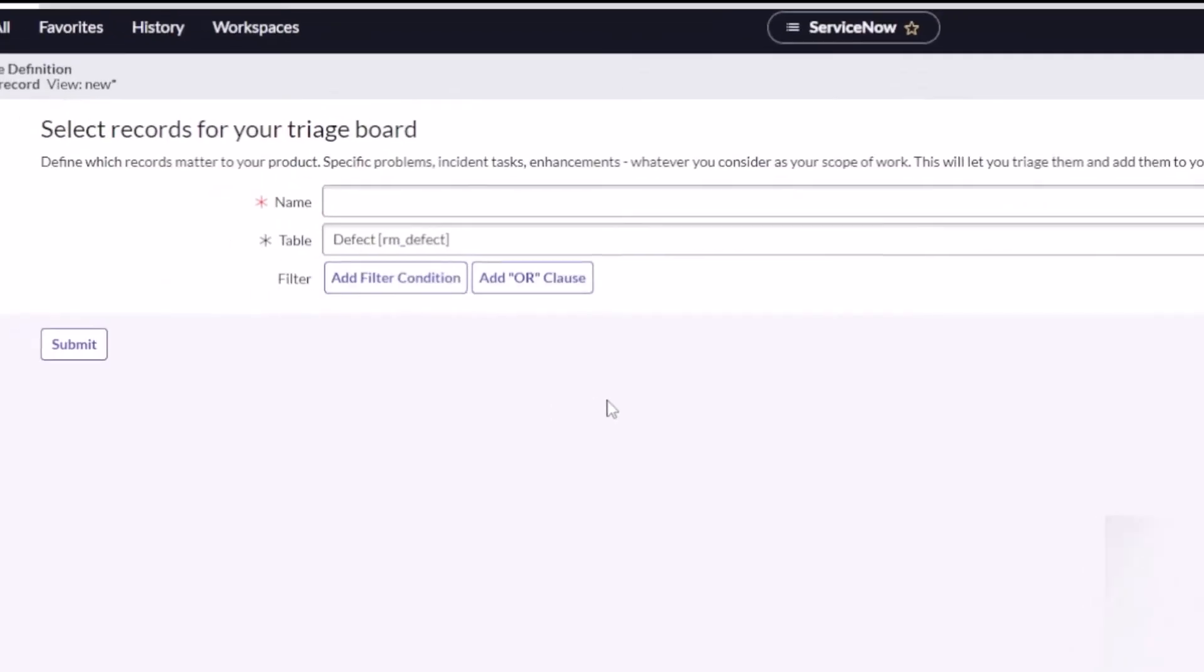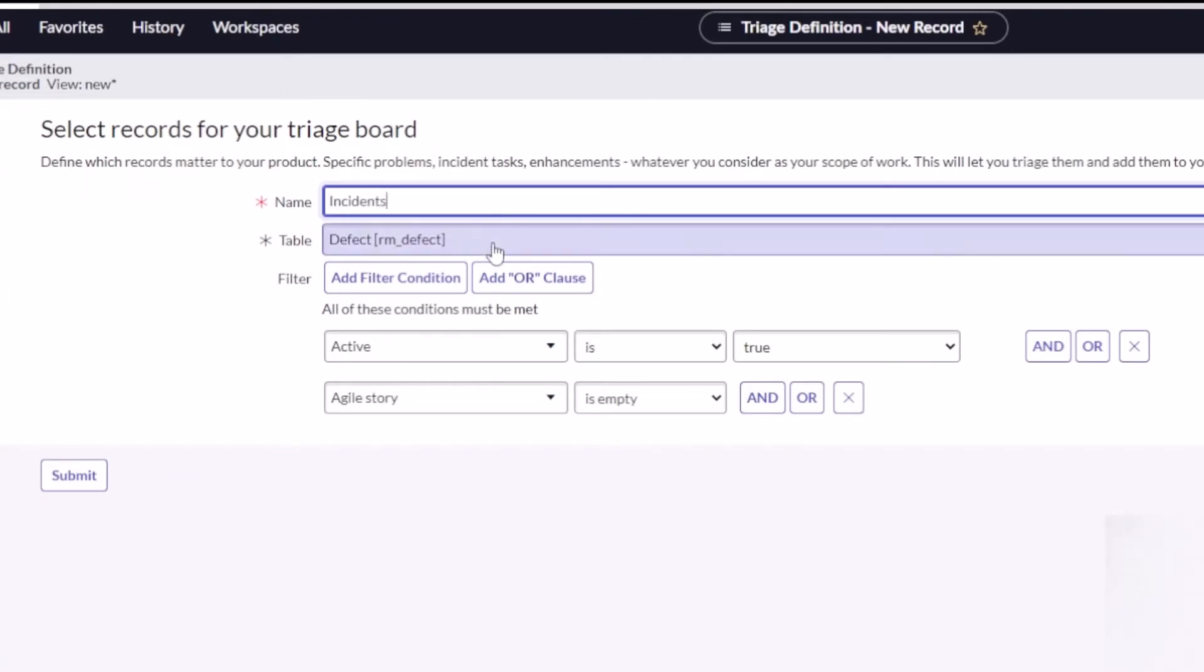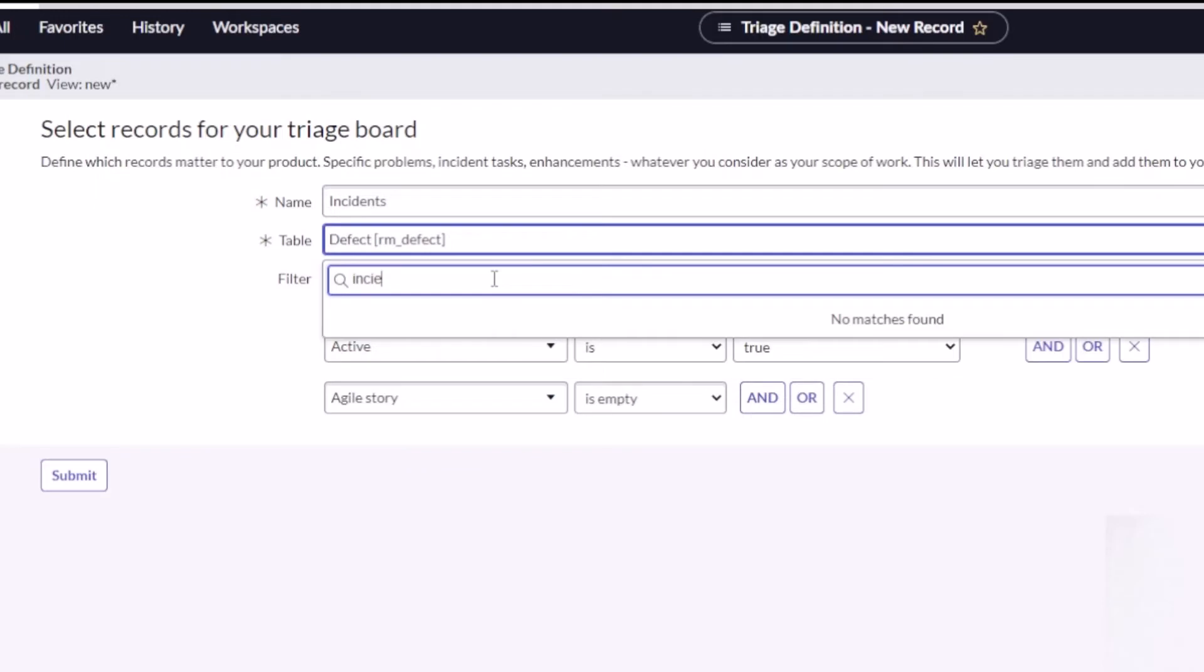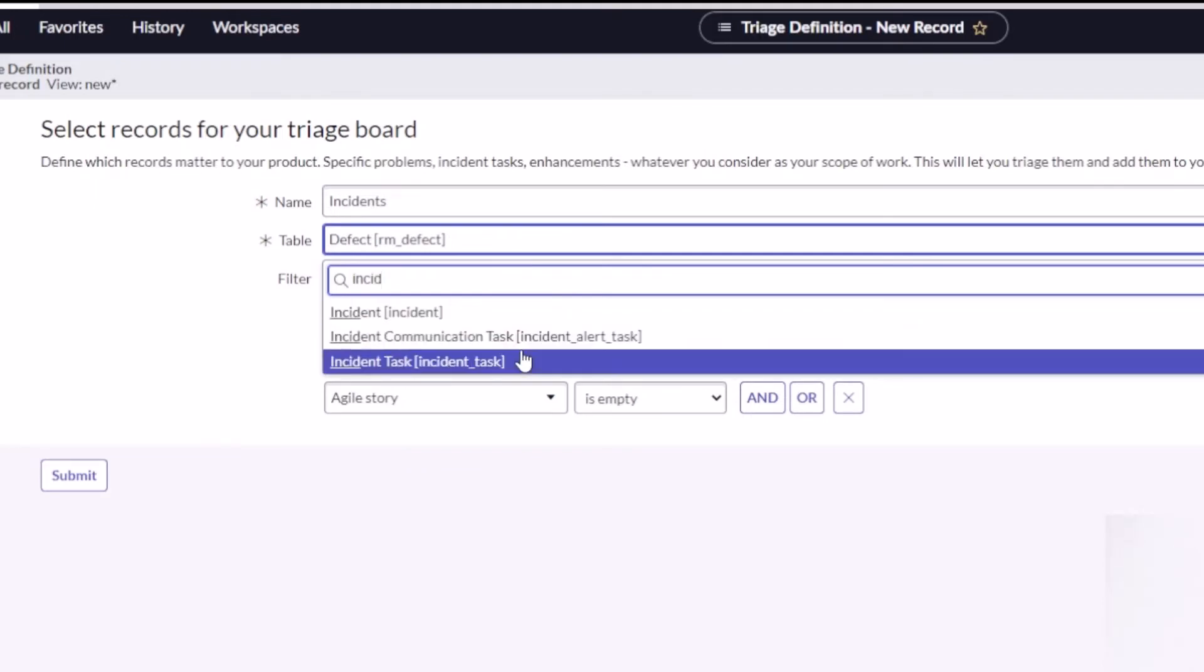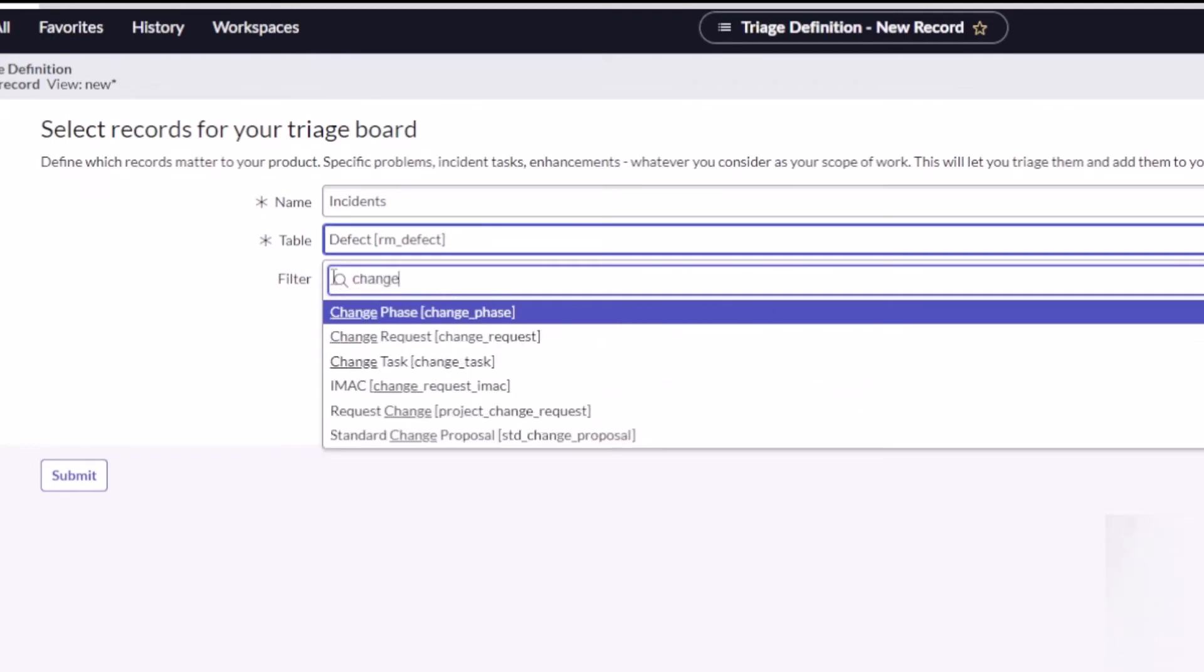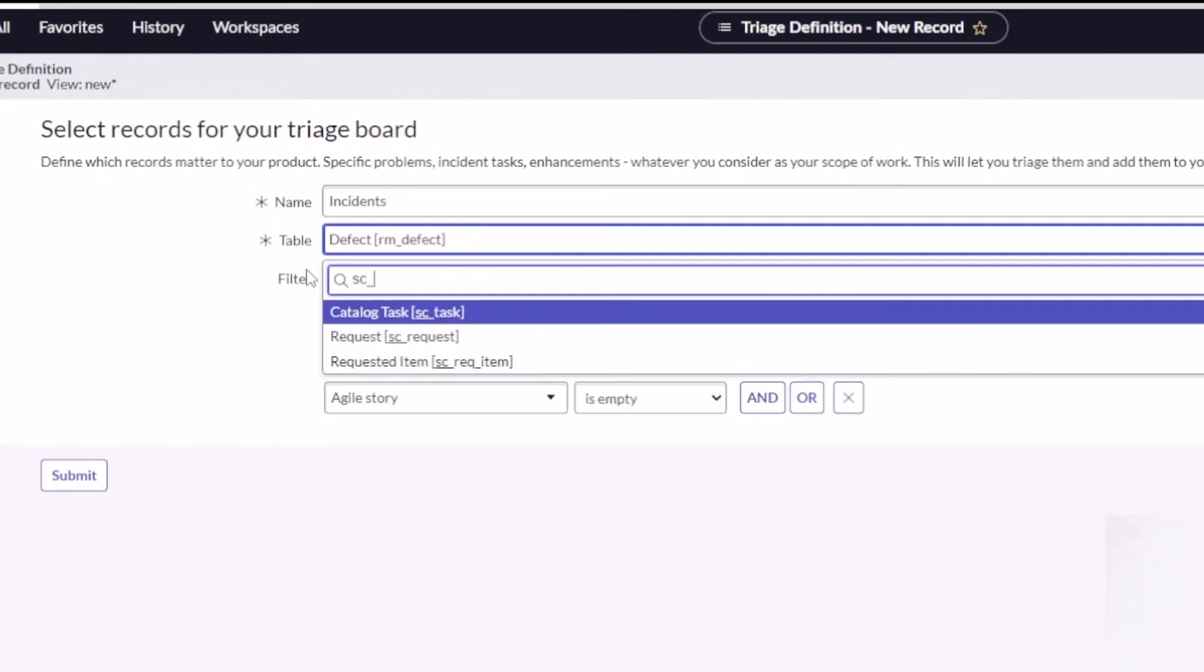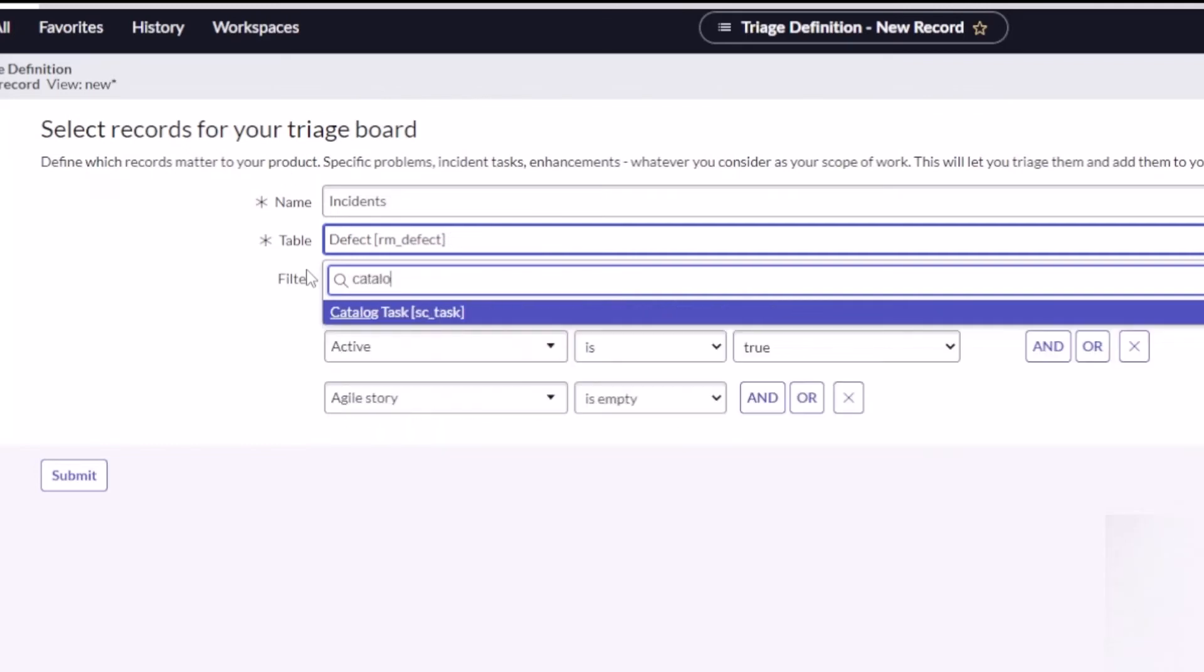If you're not familiar with ServiceNow, lots of things are based off the task table. If I wanted to pull in my incidents so I can work on my incidents, I can pull an incident or incident task and associate it and pull it into my backlog. I could do the same with change request, with problem. I could even pull in a catalog task, watch this—catalog task right here.